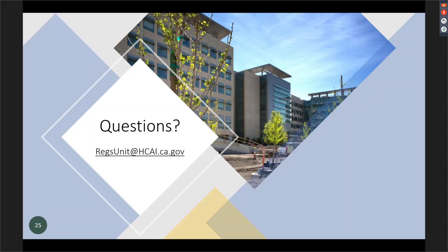What we're saying is that if either of those or any other type of means of communication requires changes to the documents, the NMA is giving you an alternative to an ACD to get them done faster if they meet one of the 8 requirements. So hopefully that makes a little more sense. This is an alternative to an ACD. Because the default was everything needed to be an ACD, and we don't want that.